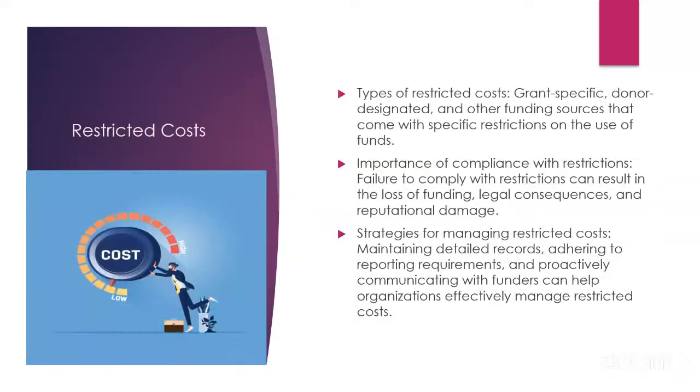Moving on, there are also what we call restricted costs. Some of the donors don't have what we call free funds. There are some items that they cannot pay for. If you use their money on those items, it can be disallowed.